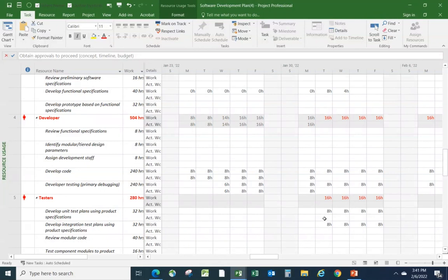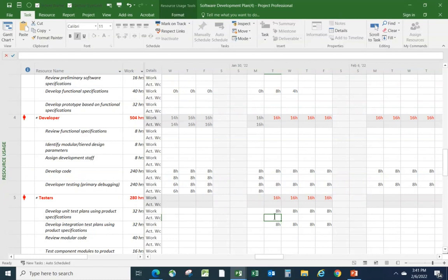And we could come in and say, okay, so for this task here, the project manager actually spent 4 hours that day working on it. Watch what happens when I do that. If I hit in 4, Project says, okay, well, we need an extra day to do the remaining 4 hours then. Either that or we assign overtime. Project manager says, I did 10 hours of work that day. That is only 2 hours off into the future after these 2 planned days. So maybe the person does 10 hours there and 8 hours there.